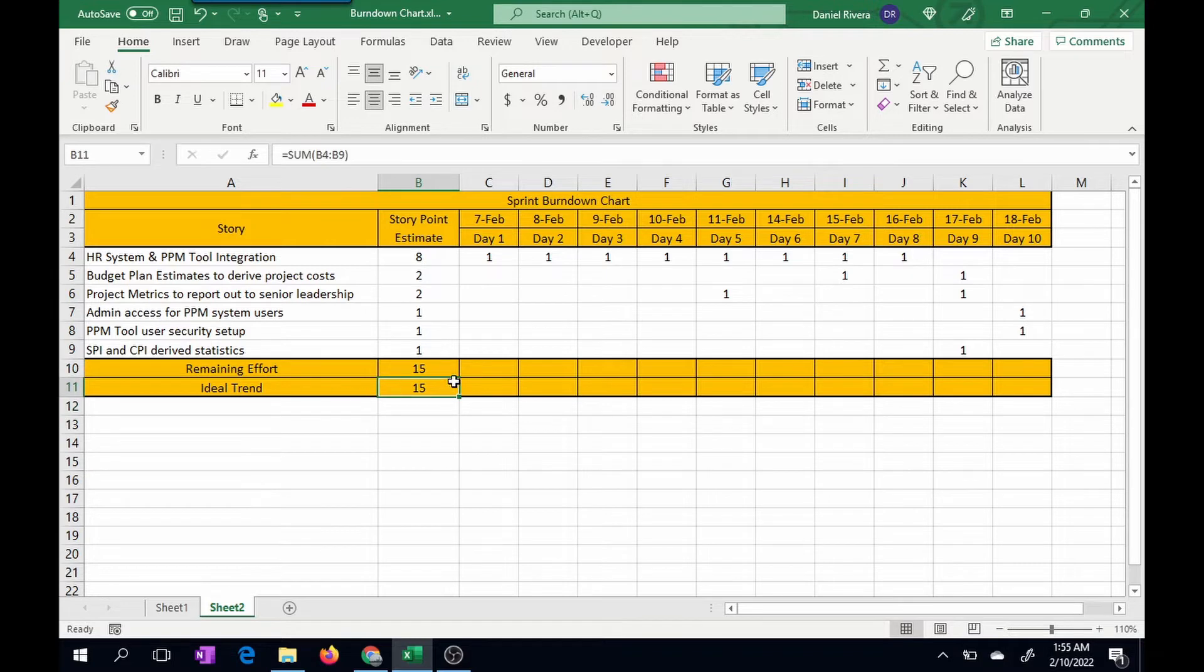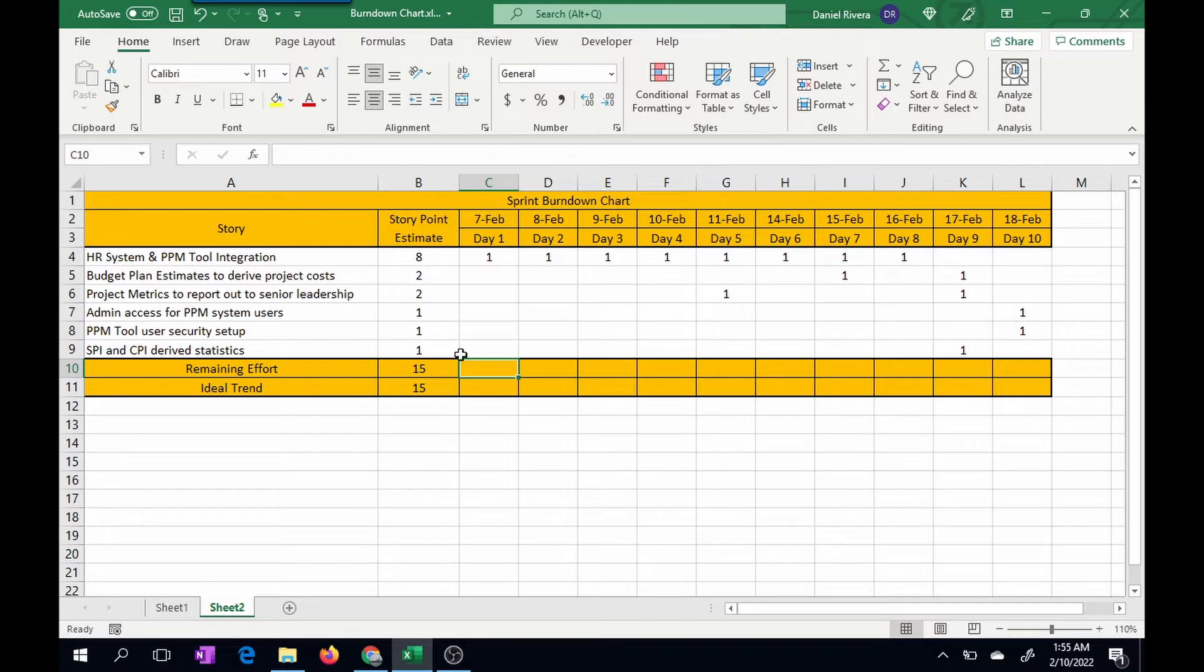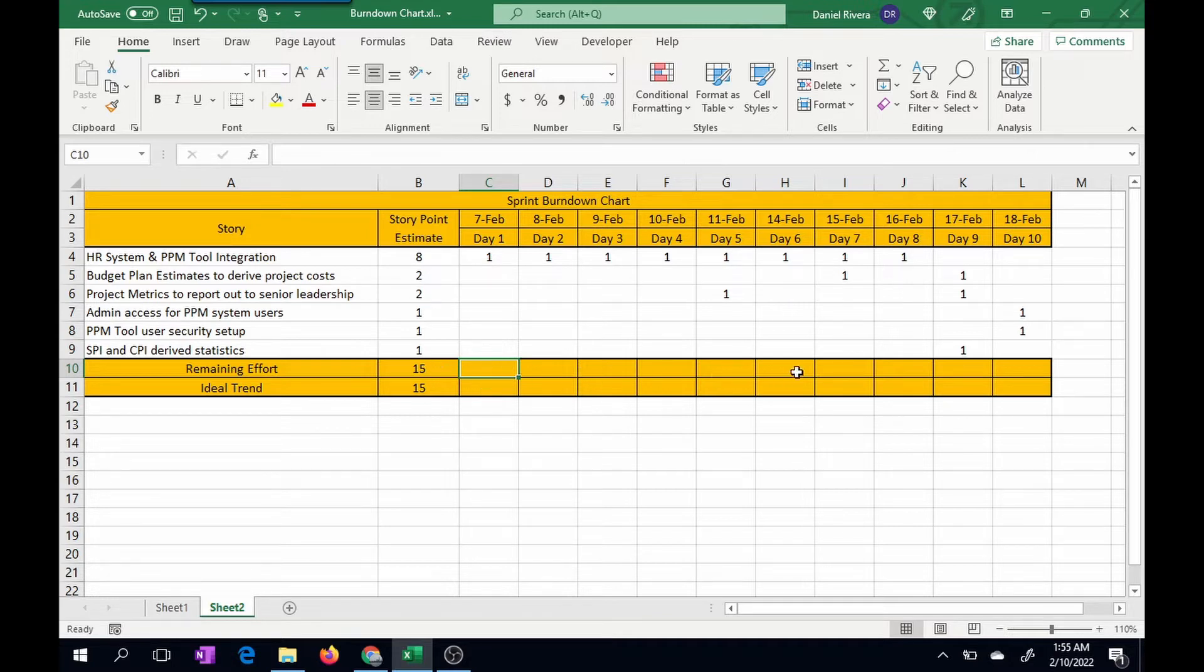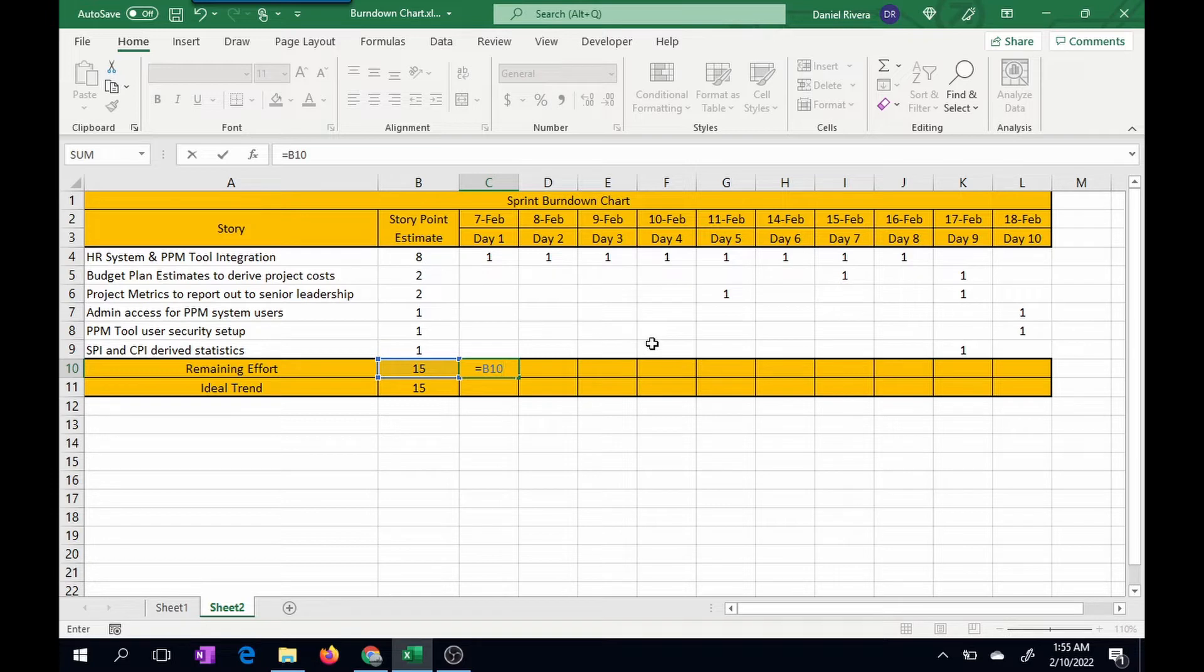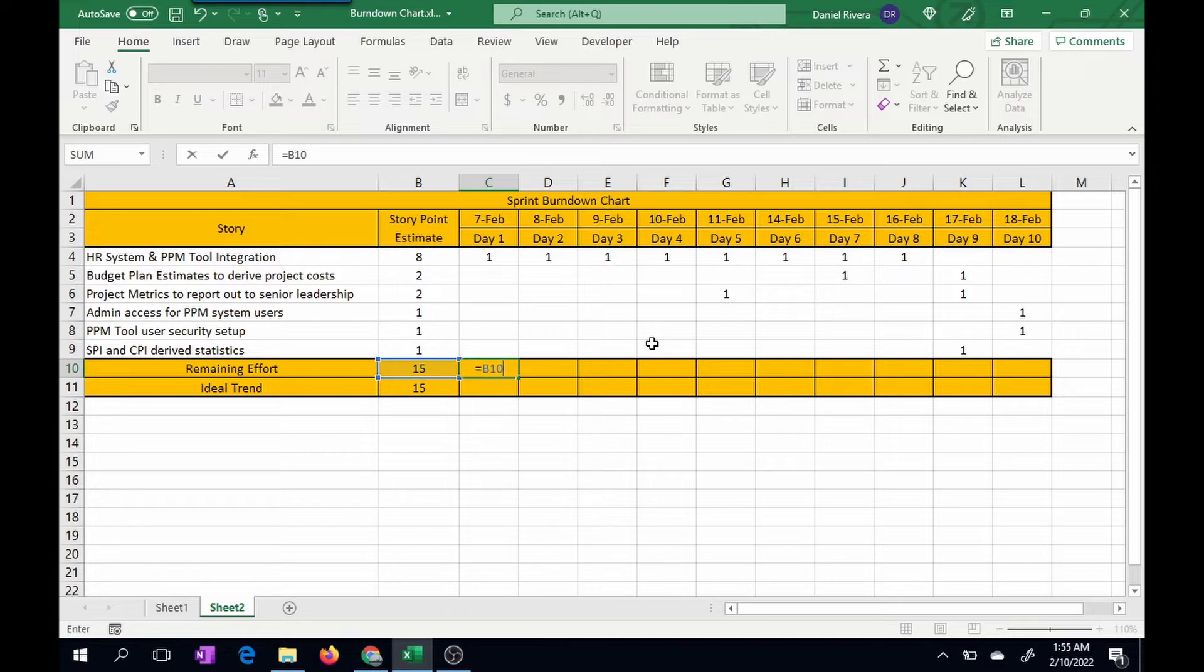So for the remaining effort, what we're going to do is take the sum of all the story points that were implemented for that particular day and subtract it from the previous day. In that way, we can find out what's remaining. So I'm going to have cell B10, which is the 15, because we haven't started anything yet. But notice I'm not making it an absolute reference because when I copy this formula, I just want it to be a running total as we burn down the totals for the stories implemented.